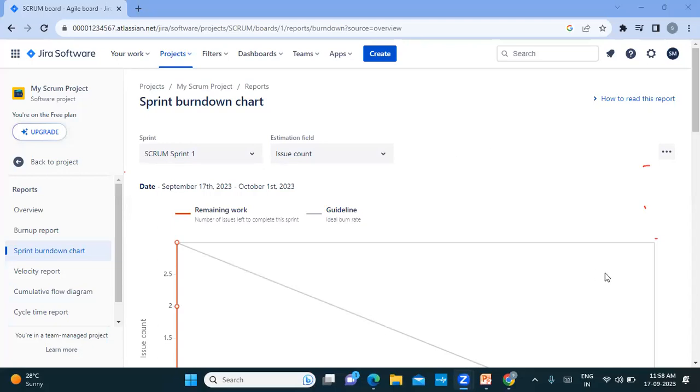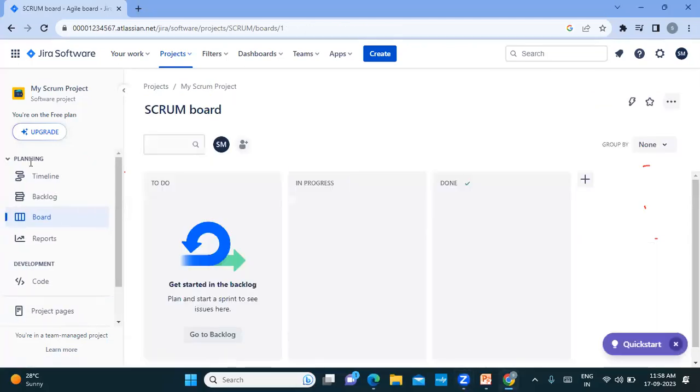Okay, guys? Ma'am, can you go back to the project? Yeah, sure. Suppose I'm adding user stories in Done, and the client tells me to make some modification or add something. What do I need to do? You need to add user stories to the product backlog. Is there any deleting option? You cannot. Once a sprint is completed, you should not touch the sprint. Whatever changes a client is telling, you will have to put it in the product backlog and start a new sprint again. Okay, fine. Yes.